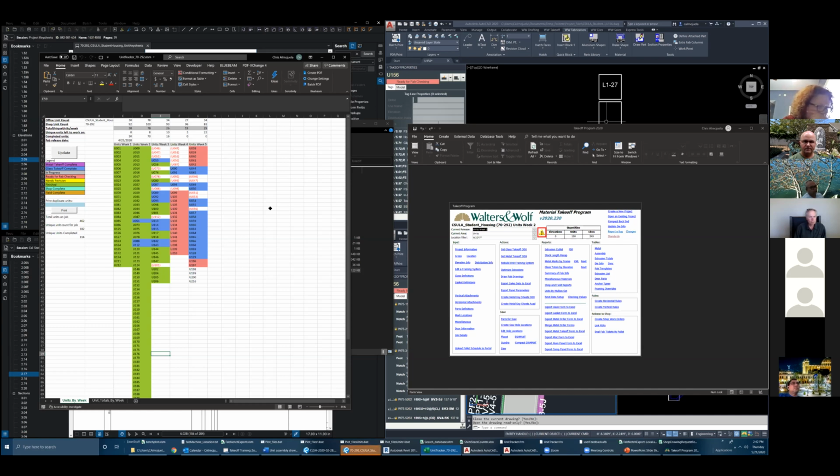Actually, I forgot to add a step after procuring all those documents. I would sit down with the project coordinator and we would talk together. It's like, hey, now that we have the elevations and now that we have the key sheets, let's go look for units that might cause issues, like transitions or slope raked bolted units, anything that might need more coordination than your typical intermediate units. I want to address all the difficult areas first in case we need input from the field or the shop or the engineer.